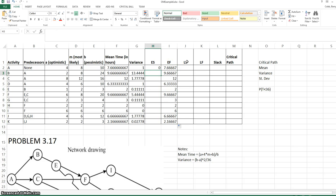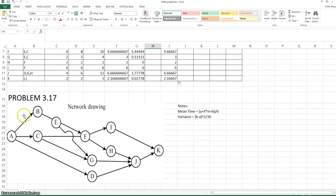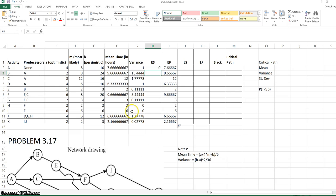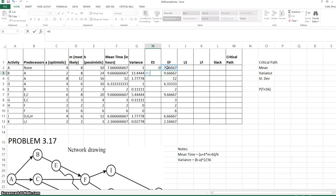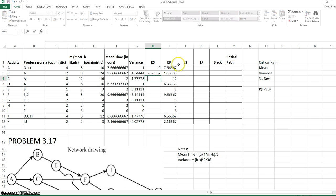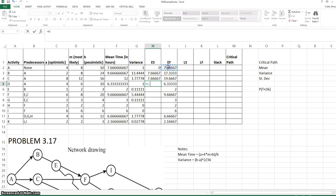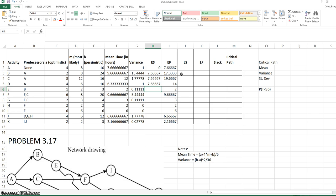Now we need to go through the rest of the activities and find the earliest start times. The early start times for B, C, and D are all the same because each of these follow A in the project network diagram. Each of those will just be a reference to the early finish time for A.